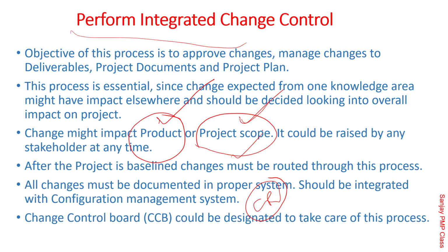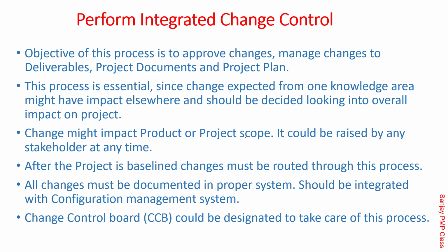Project scope. So even if you want to make this, you'll have to raise a CR saying that I want to give such and such training. The change request board will see that Swati is saying to give this, it is a brilliant idea, but how much money will it cost? All those things they will have to see, and that's what project scope and product scope are. If you look at all types of projects, there is a product scope and there is a project scope. Is that correct?